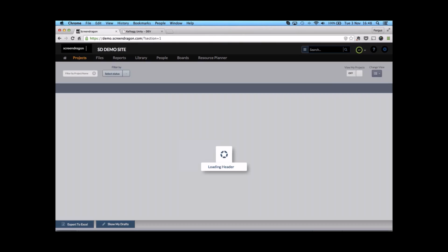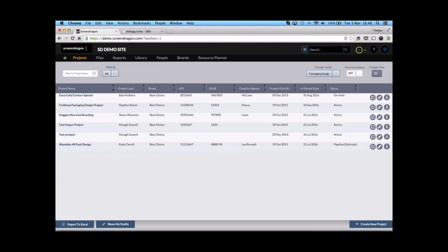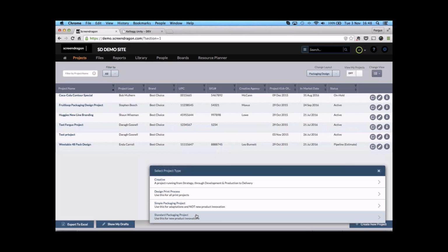Okay, so within this particular client, when somebody launches a project and they pick one of these, we have a standard timeline attached to that, such as 24 weeks for that sort of project, for that sort of brand. When they request 16 weeks, we know that that's over a 30% compression, and we then route the request to, I believe, an SVP, and we flag it as this is over and above the normal compression.